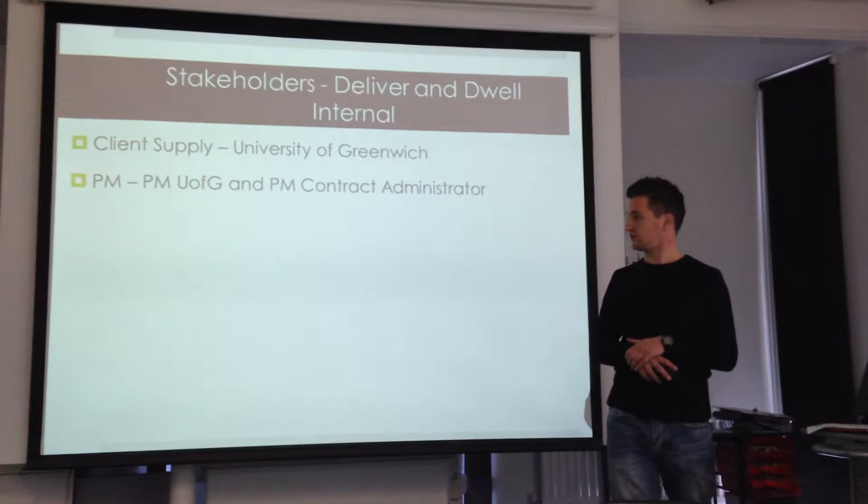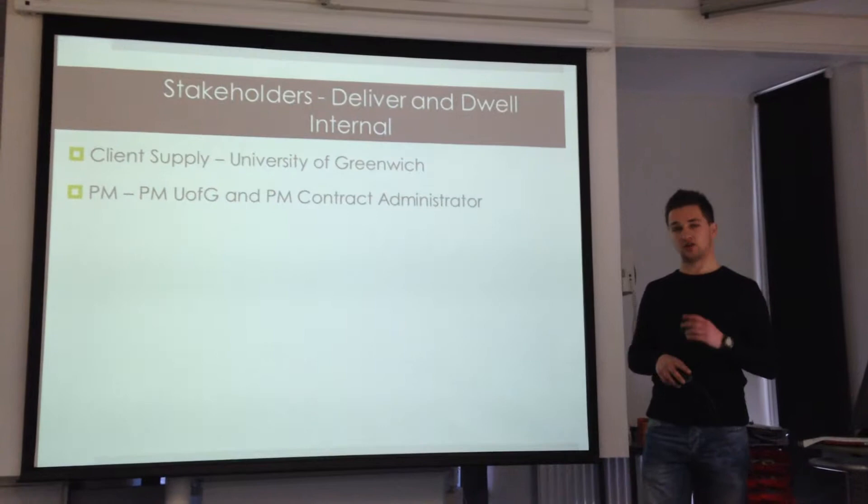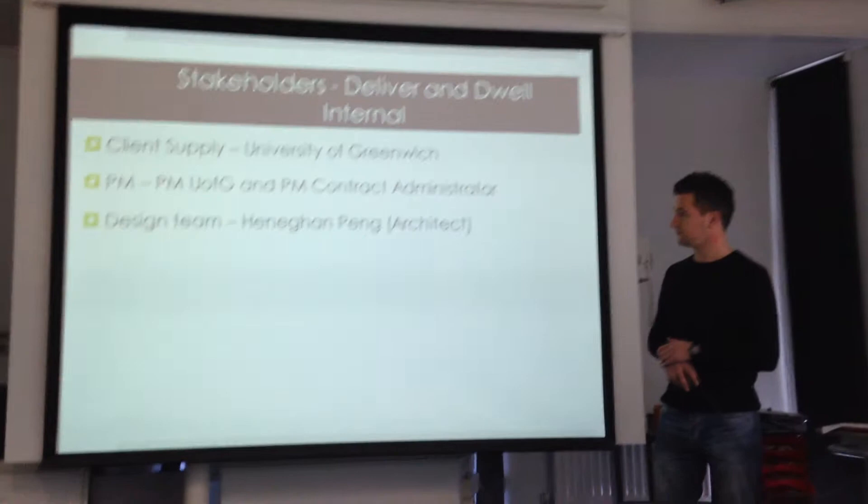Under client supply, we have project managers. There are two project managers: one for the University of Greenwich who deals with all the user groups and the University of Greenwich design team, and a project manager and contract administrator who deals with the project team and directly with the contractor.